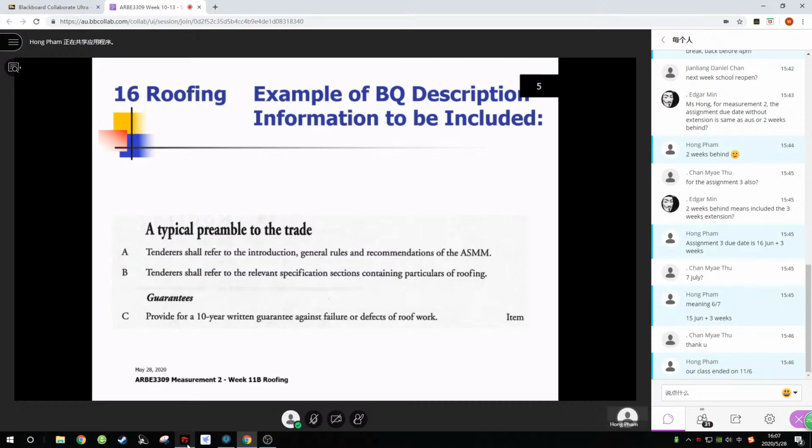So how do we prevent the cases where, when they fix the membrane, there's some defect, and then we go and tile over it? In Singapore, especially for the roof and also the waterproofing for the bathroom, we will request them to provide a water test. It's called a water tightness test or water bonding test.